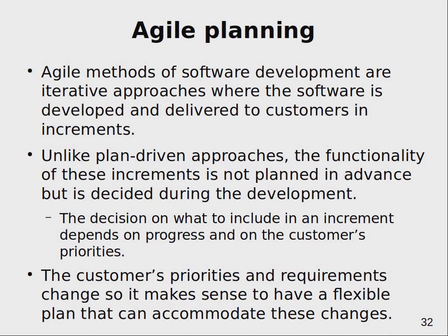But because you think it's not efficient to do a detailed plan for the entire project until the very end, you do precise planning of who does what when only on a smaller time scale, like one particular sprint for Scrum projects.